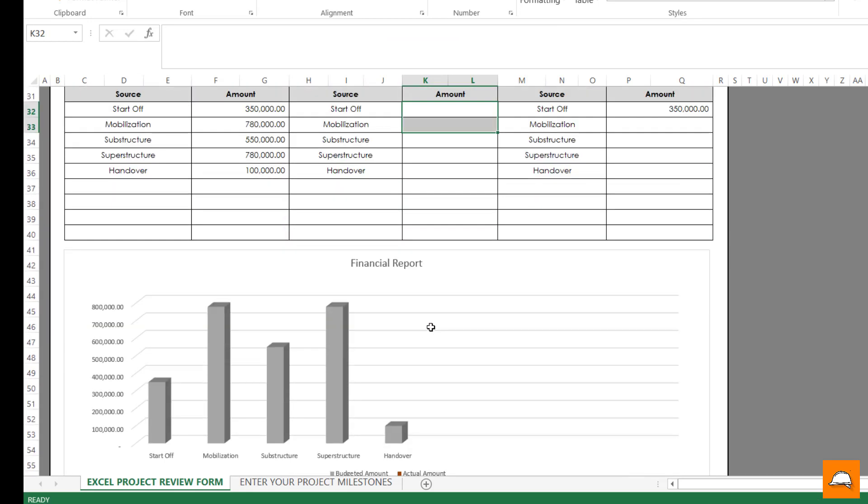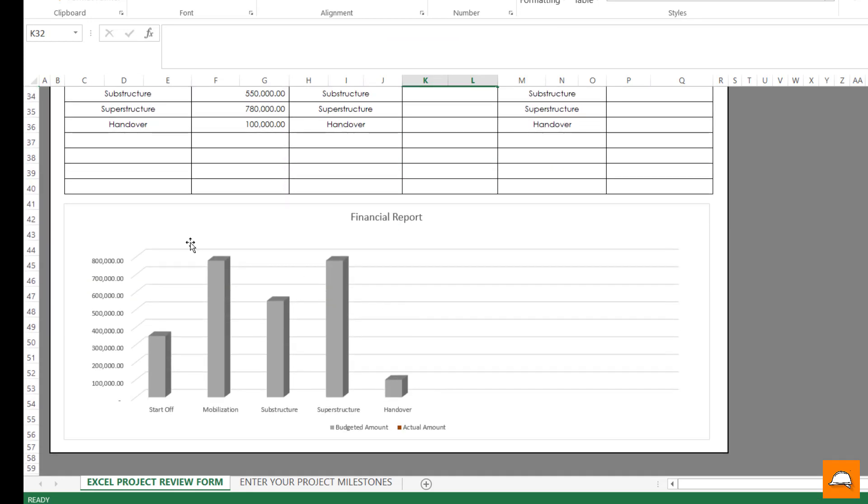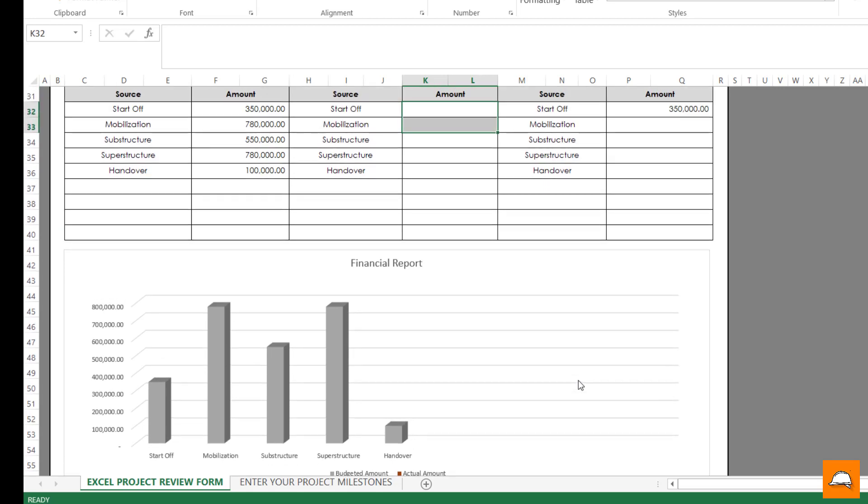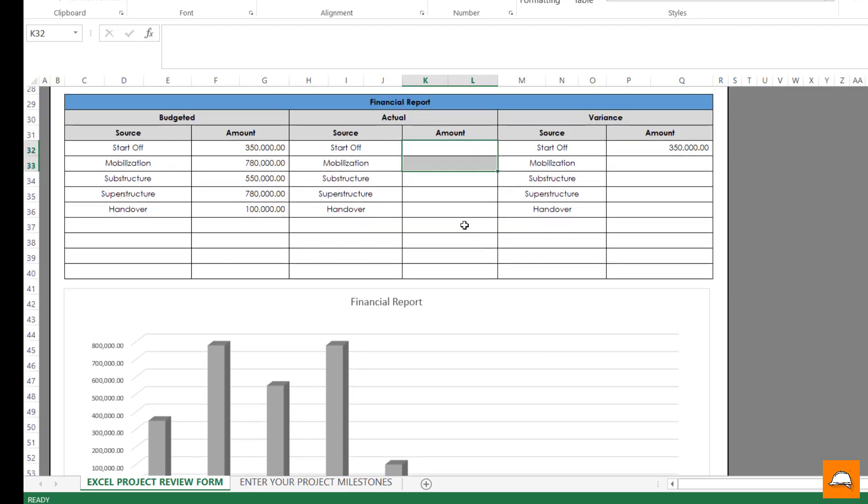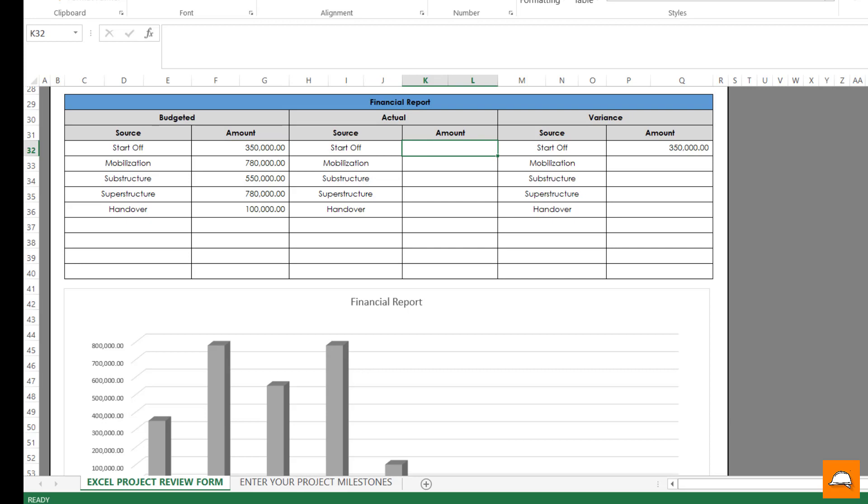So then we are actually updating the project. This particular chart has already been generated. So you see start off as 100% completed. At your BOQ you have quantities, price is 50,000, but once you have completed it you have encountered 375,000.